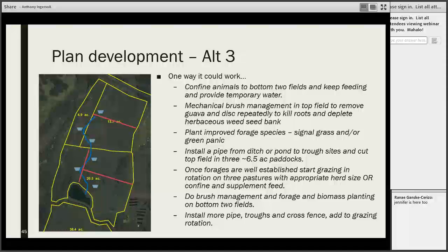So once you have this planned sequence in mind and the quantities that can work for the client, now you can start to figure out how you break it up and discussing those specific time frames as far as months and years with the client based on his availability and what else he has going on in his life, and the amount of time and timing that we know that we'll need for vegetative establishment and we can take that information and start drafting it in toolkit as a schedule.